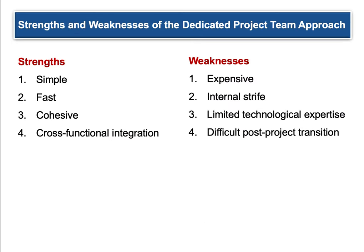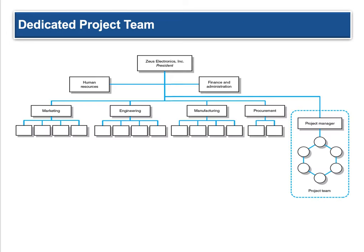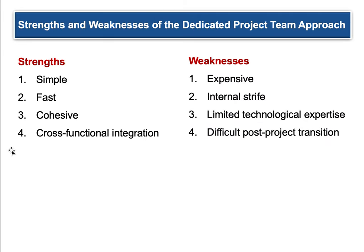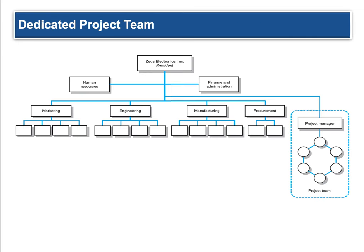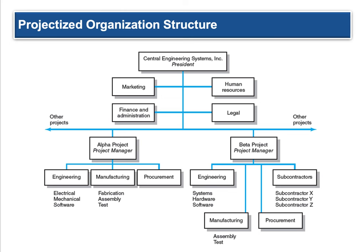Let's look at strengths of the dedicated project team approach — whether projectized or on-branch. Strengths: they're simple, fast, focused on the project, cohesive as a team, and have cross-functional integration, with marketing, engineering, and finance all in one team. Weaknesses: it's pretty expensive — dedicating time and money to projects that may or may not get off the ground costs money. There can be internal strife and competitiveness. There's limited technological expertise in that you don't have a full engineering or manufacturing department weighing in. There's also difficult post-project transition — you're dedicated to one thing, then you must reintegrate into the corporate structure or move on to a different project.